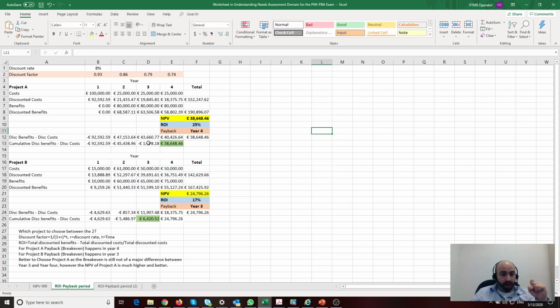Year 3, again, the same concept. This, and I made 43, so I'm down by around minus 2k euros. Am I right? Yeah, this minus that. Oh, sorry, minus 1.7k, almost 2k. Year number 4, again, this minus that. Now I'm up. I'm positive. You see, I'm green. I broke even here. That means I've returned the investment and I made profit. I went above 0. So we say payback period is year 4.